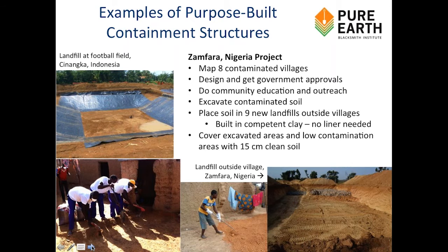But in that site, after we got the government approvals for each site, we built the landfills and excavated the soil. You can see on the lower left the workers excavating the actual soil. They would put it into bags, load it into the trucks, and bring it over to the nearby landfill where it was deposited, as you can see in the far end of the site, the picture on the lower right, and then compacted and covered. And then all the contaminated material was covered with clean soil, which is the bottom picture.